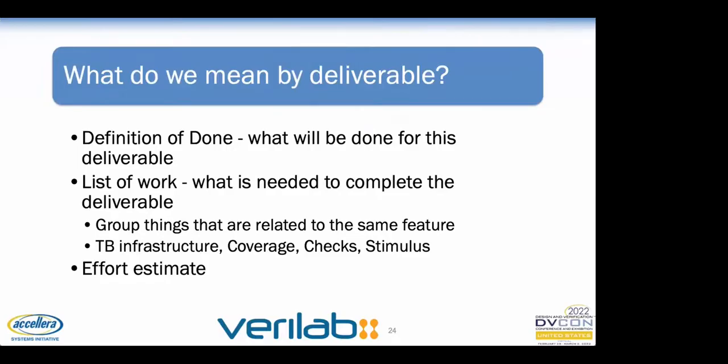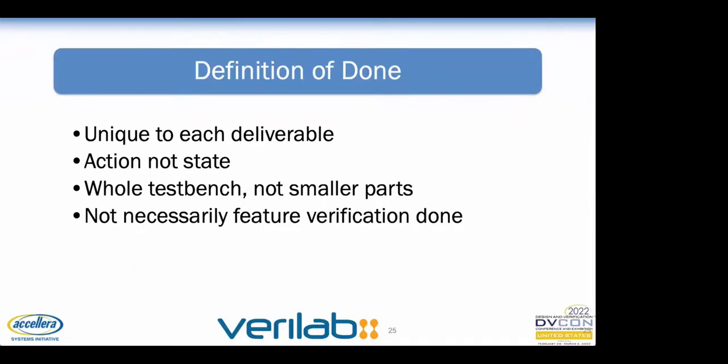As we get started planning a verification effort, we want to divide the work into about a dozen deliverables. It's a handy number to work with early on in the verification effort, as it is enough to provide detail and specificity, but not so many that they aren't easy to keep track of. In my experience, too few deliverables leads to things like half done, 80%, 100% style deliverables, while many more leads to lists of hundreds or thousands of deliverables that are hard to manage.